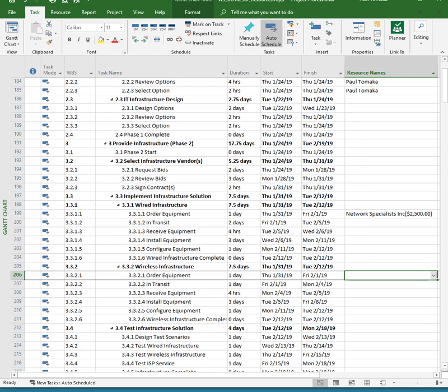All you have to do is think about what you're going to pay for these particular things. So you go through and you look at your project plan and you look at the hardware, the software, the networking, the training, all that other stuff. If you're going to outsource this to different vendors, figure out what you think you're going to pay them and think about it in advance. And you can actually put it on your spreadsheet. And then all you do is you go in here and you add it.